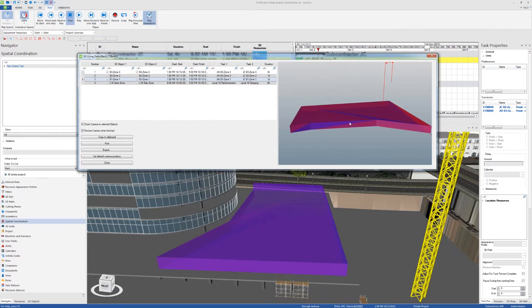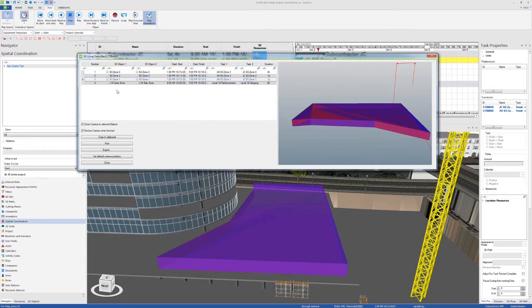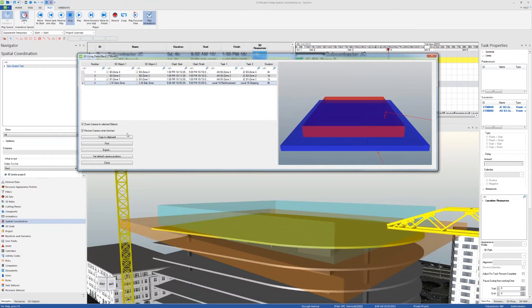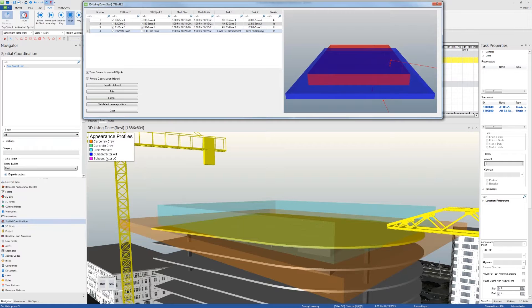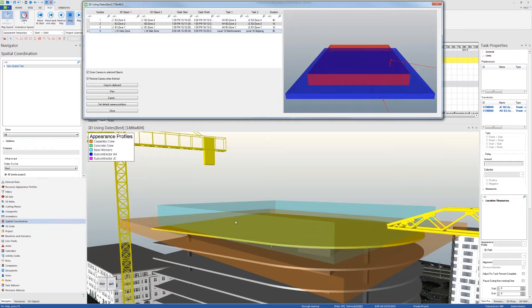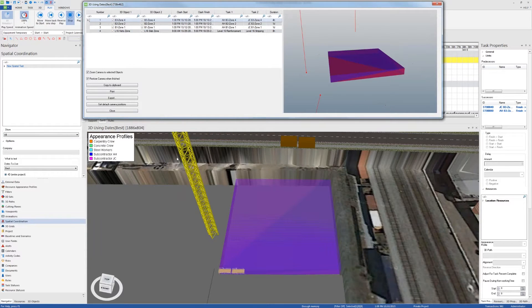The fourth clash, it looks like the steel workers are working on the columns while the carpentry crew is working on stripping the formwork of the slabs. This clash is okay, so I'm not going to worry about that, but let's try to fix these.